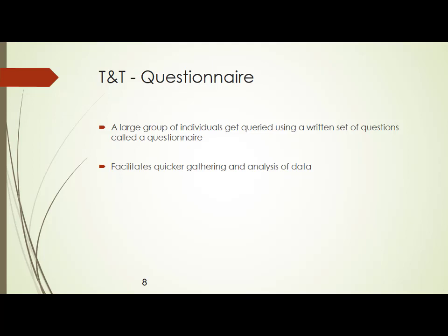And it is also quicker. Why? Because I just have to create one questionnaire. Maybe I am going to create a Google form, and I will send that Google form to all the 100 operators, and I will give them a time frame. All of you should respond to my Google form and send it back to me by such and such date. So they respond by adding the details and sending it back to me. I will collect those forms, and it will help me in gathering and analysis of data. So this is also one of the tools and techniques for collecting the requirements from the stakeholder.